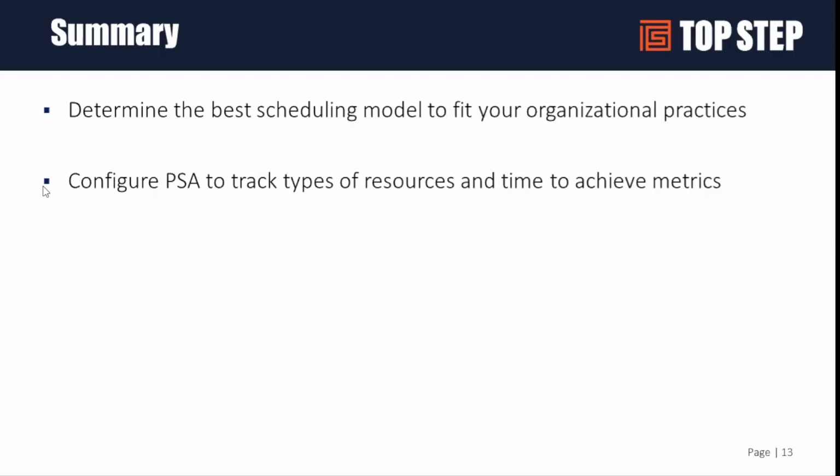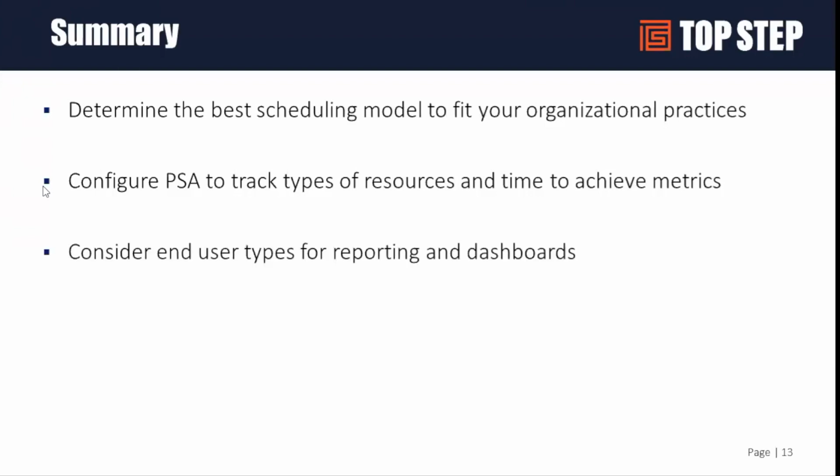Either way, you'll have to set up OpenAir to be able to track your resources by the different types. In the basic model, remember, it was by project stage, and having some kind of project stage cycle that would feed both managing your project life cycle as well as your scheduling commitments. But if it's larger projects, you may have to introduce things like booking types, and maintain that booking type for accurate data.